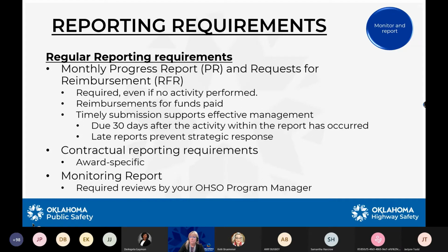Your reimbursement request can only be processed for funds you've already paid, so we need a zero balance or a check attached. Your organization is responsible for making sure reports are accurate and timely, and reporting is due no later than 30 days after activity within the report has occurred. Again, no later than 30 days.